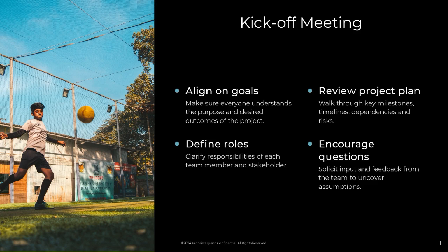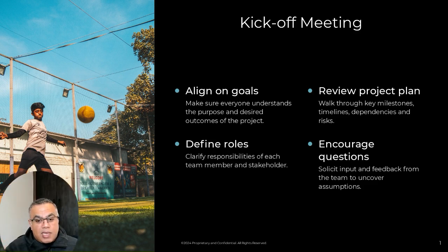And finally, once you've got all those things, do a kickoff meeting. Now, this is where you bring everybody together and say, okay, we've got the information, talk about the scope, align our goals, define the roles, review the project plan, and make sure that everybody's interacting. Make sure everybody's on the same page, make sure everybody agrees the plan. This is probably an opportunity. There may be some iterations of the plan, but ideally you shouldn't be at that stage. You are then clearly defining everybody's roles and responsibilities within the project, what you expect of them, when to expect it, etc. So there's a clear expectation.